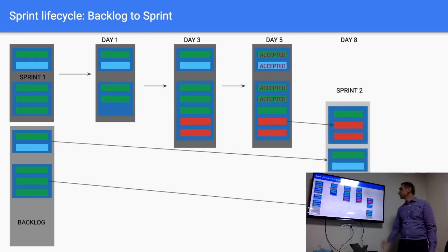So this is a 1 week sprint that we're looking at, and then we decide our next sprint. So in the next sprint, what all is going to go? So we take a few which were left from the previous sprint. We add on some from our backlog, and then we reduce the backlog down. Right? And that's how the development process goes. Not discussing Scrum meetings or things like that; those are for later. But this is effectively what a lot of us have experienced.